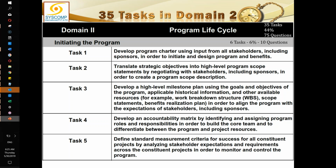Task 2 is translating the strategic objectives into high-level program scope statements by negotiating with stakeholders, including sponsors, in order to create a program scope description. So what are we trying to do? We have already created the charter. We understand the strategic objectives, and we are trying to break down the program strategic objectives which have been given to us into high-level program scope statements, which naturally we are negotiating with the stakeholders, involving them in it. And what we are trying to do is to actually come up with a program scope description.